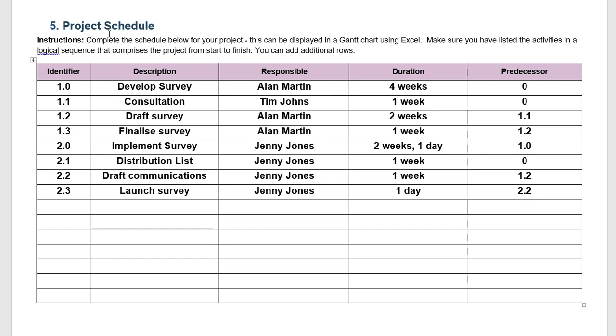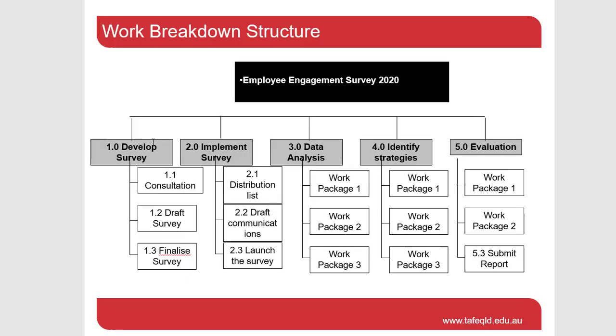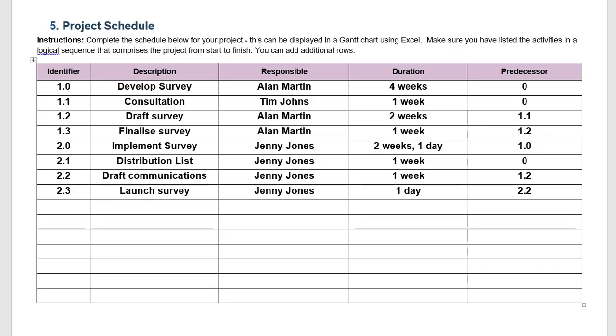So just check that your project schedule exactly aligns with your work breakdown structure. So if I were to complete it I should see everything all the way to 5.0, all the way down to submitting report, all coded the same, all named the same, so that there's synergy and matching between the two.